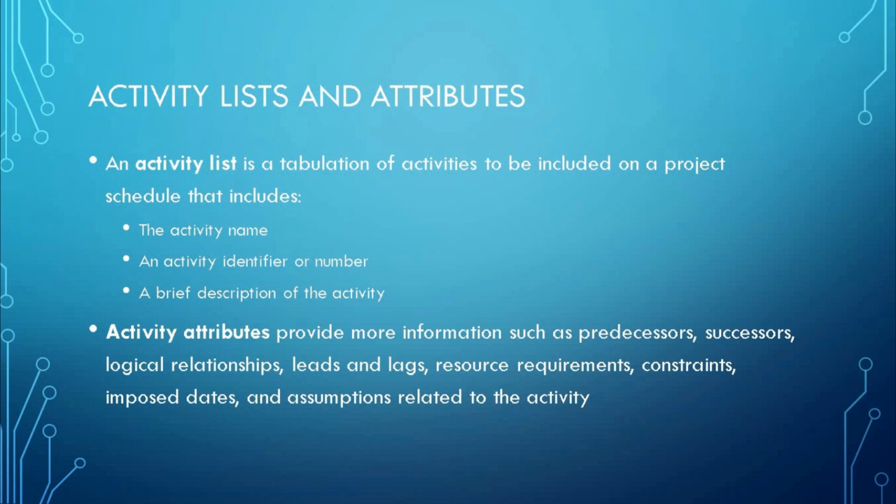It is created after the requirements documentation, project scope statement, work breakdown structure, and the work breakdown structure dictionary have been created and they are under control. Therefore, it is important for project managers to involve the team in defining the activity list so that the estimates are more accurate. Activity attributes typically refer to the specific components that make up an activity.